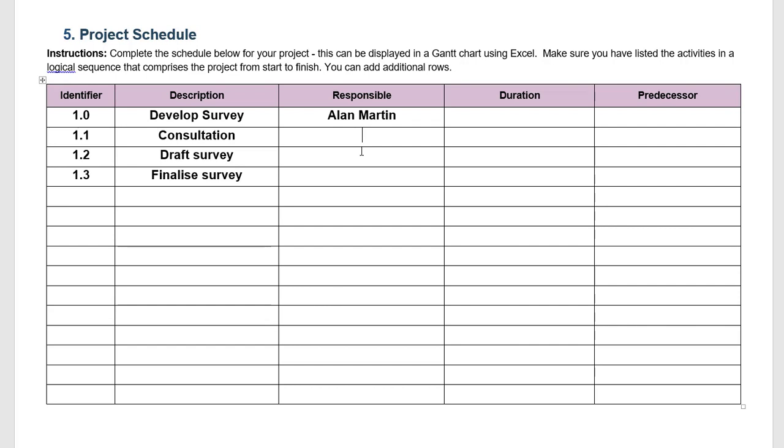We may have different people in charge of all of these things or Alan may be looking after all of them. It depends on your project. So firstly, how long will you need for consultation? This would depend on how big the organization is, who you would need to consult with, is it done face-to-face, via phone, via email, really depends. Here I'm going to put one week for consultation.